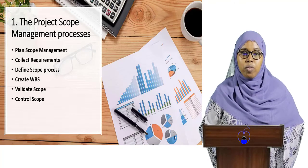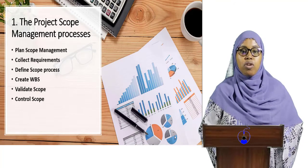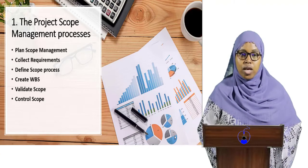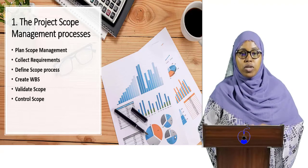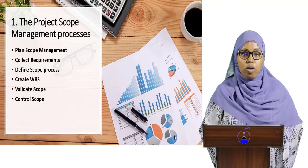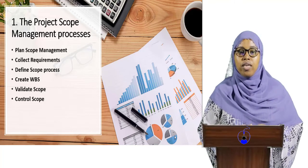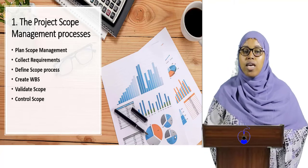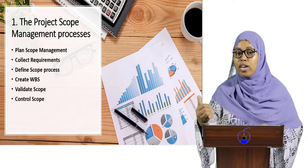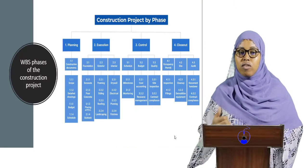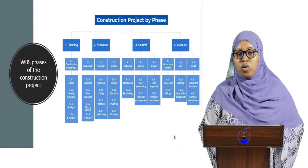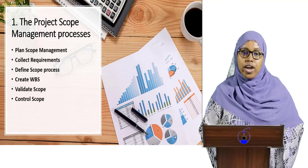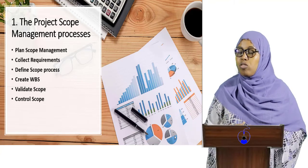Project scope management — the main purpose is to divide major deliverables into smaller, more manageable components for easy execution. You can complete scope management by collecting information requirements from the client or project team. Then the project manager can define the scope management process, and you can create a WBS. Finally, you need to make the scope control plan.